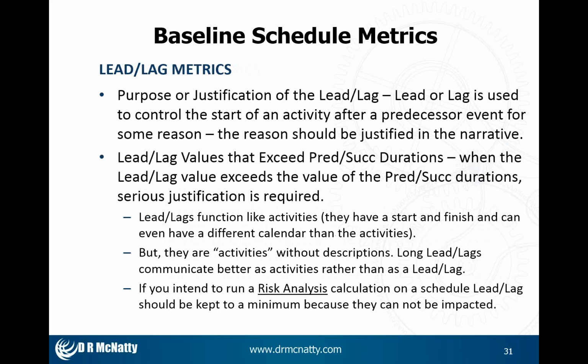Lead lag metrics. So the purpose of the justification of a lead, and in P6 we call it lag, but some software call it lag. If I'm looking backwards, it's lead. If I'm looking forward, it's lag. Whatever you want to call it, I'm using the word lead lag. The purpose is to control when a successor starts based on when a predecessor starts or finishes.